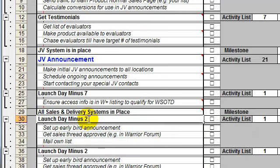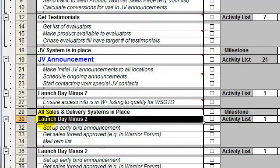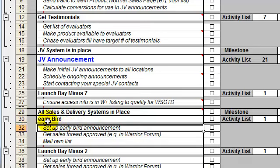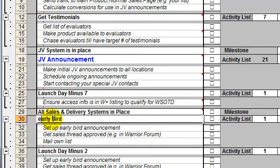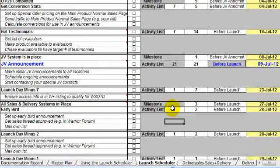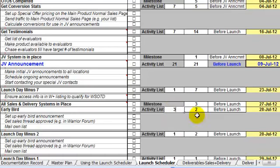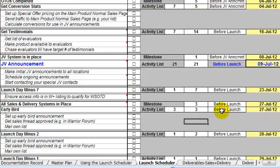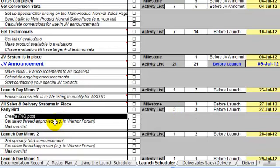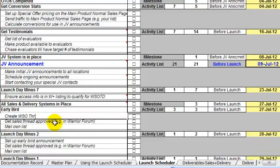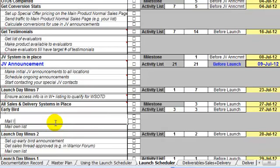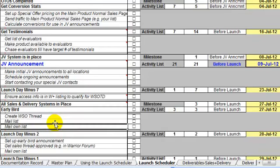Let's say I'm going to call that early bird. That's something that's going to last three days, and I want it to start three days before the launch. So that's going to start on the 27th. And just put in the tasks to set that up - so that would be create WSO thread, mail list, etc.